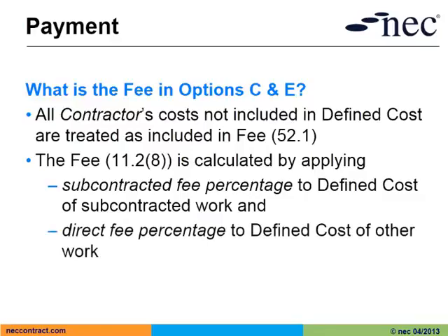It is generally expected that a subcontract fee percentage would be less than a direct fee percentage, as generally speaking, there is less contractor overhead incurred in managing a subcontractor than there is in managing his own resources.